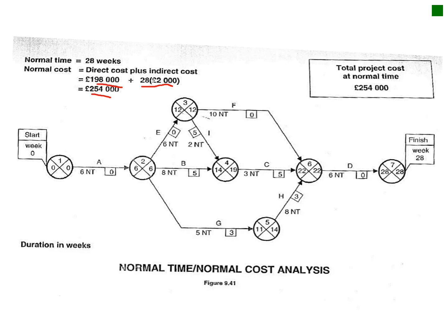What they did is they just put in the time durations, and then they had a look at what the longest path is to see what the duration of the actual project is. So a simple way of doing that is starting from the back. I'm going to mark that in green and go backwards, looking for the longest path. Okay, so first item is D, that is on the critical path.